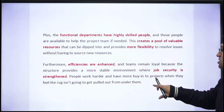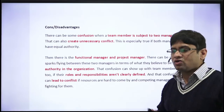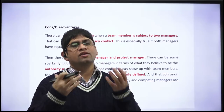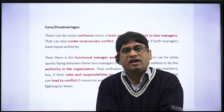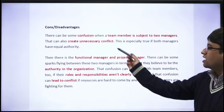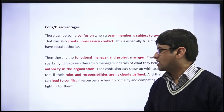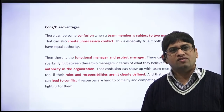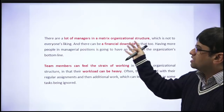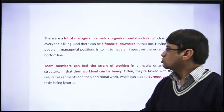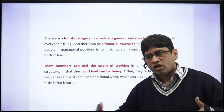Now, the disadvantages of matrix organization: there is confusion because one employee reports to two bosses — two chains of command — so roles are not clearly defined. Conflict arises because interpersonal issues are always present between the functional manager and the project manager, and authority and roles are not clearly defined. Additionally, there is always some financial burden on the organization when setting up a matrix structure.